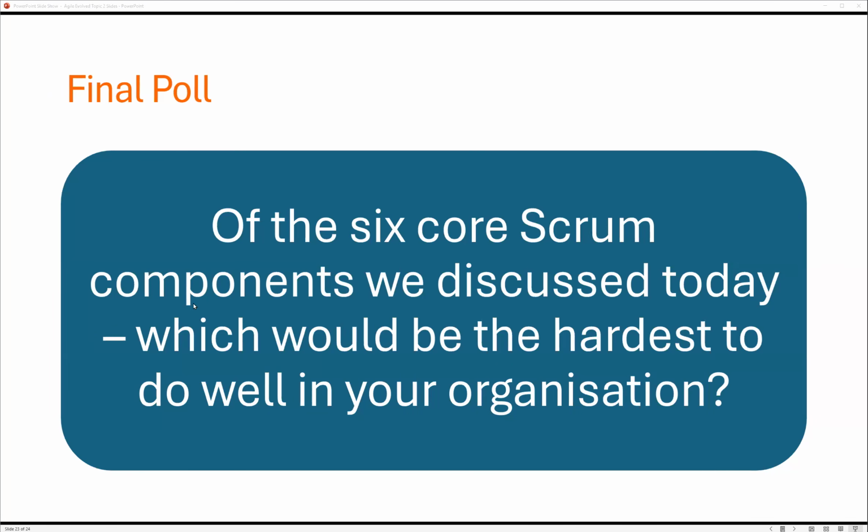Excellent. Would you expect risks and issues to also be captured on the product backlog rather than a separate risk register? Sometimes, yeah. You might have a technical or a user story that is specifically there because of a risk, or specifically relates to a risk. It might be, figure this out so that we know what that risk is.